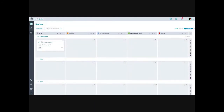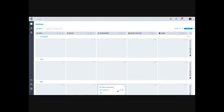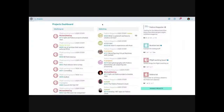This shows swim lanes in action. I've set up a default 'unassigned' swim lane, then a swim lane for Alice and one for Bob, with different work-in-progress limits for each. You move cards between swim lanes as needed. You probably won't separate on people for most teams, but you might separate on roles, especially for larger teams. For most Fedora teams, which are focused enough, swim lanes probably aren't going to be very helpful — but they're there if you need them.